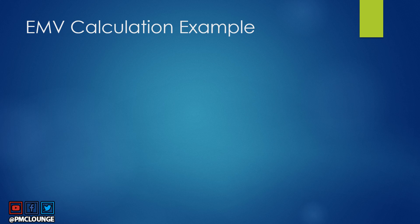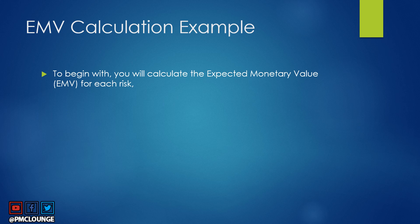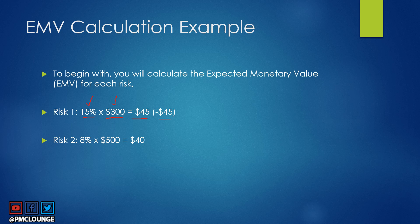Let's calculate EMV for each risk. Risk one: 15% probability × $300 cost = $45 EMV — this is negative because it is an additional cost. Risk two: 8% × $500 = $40 EMV — this is positive, and I'll explain why shortly. Risk three: 10% × $100 = $10 EMV — also negative because it is an additional cost.